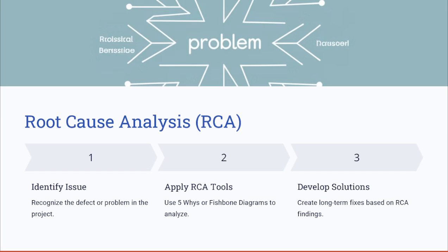So you need to ask yourself why there was a huge number of escaped defects in this release. You might find that you had too few testing professionals or QA team members to test these features and functionalities. And then you also need to ask yourself why there was a lack of planning of these QA processes and QA activities.